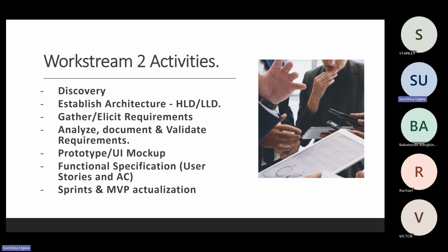Now, as our requirements are taking shape, we obviously need to have some level of documentation. So I wouldn't personally take a requirement from a stakeholder without proper analysis and then start writing user stories. As a matter of fact, even before I start writing user stories, I normally just create an Excel document where I capture each of those requirements and organize them based on their functionality or capability. System shall do this, system shall do that, system shall notify seller once a dispute has been raised, and so on and so forth.